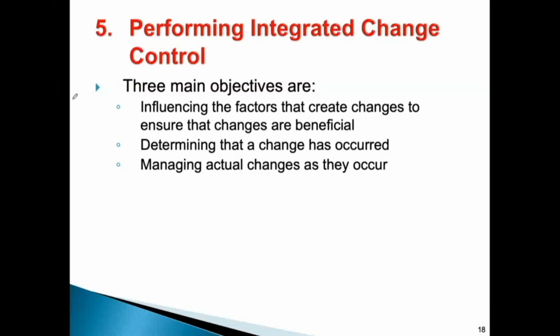Also, determining that change has occurred. Sometimes maybe the change is requested and then approved, but no one did that change. You got all the documents, it was checked and approved, but no one went and did the change physically. So you have to ensure that the approved changes are implemented.